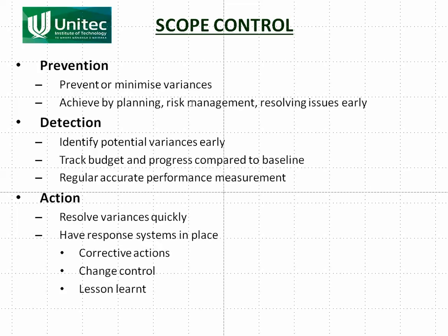What are the things that could change our scope? It might be the client changing their mind. It might be that we're going to strike rock. So if rock was the risk, then you would be doing geotechnical investigations. And when you do find something that's a potential change, you resolve the issue early.